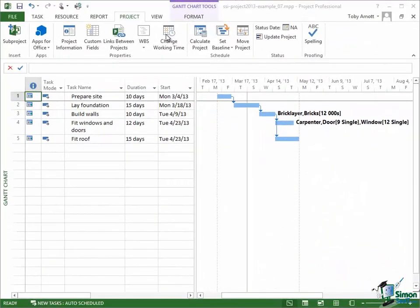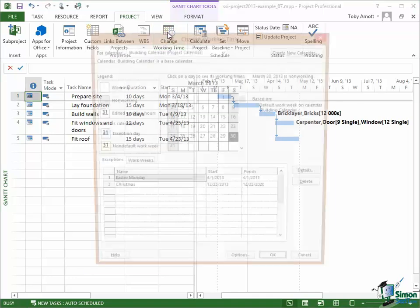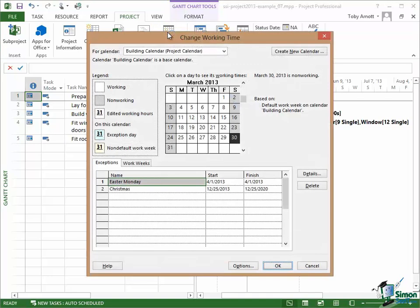So now I'm going to go back into the Project tab, Change Working Time, and look again at the building calendar which is now marked as Project Calendar. You can see the two exceptions I've got there, Easter Monday and Christmas. And what I now need to do is to add the rest of the public holidays for this year.